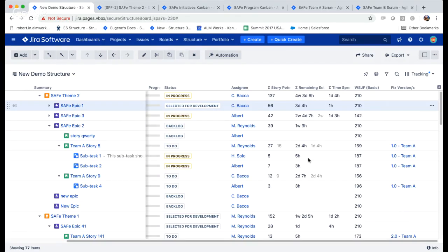Right now, I'm not convinced that this is at this point a very good idea for customers, because I know how we do that in Agile Hive. We have a scripting engine, like Power Scripts, for example, or Script Runner, whatever you choose. There are other alternatives as well. Let's take weighted shortest job first: the business value, time criticality, risk and the story points.